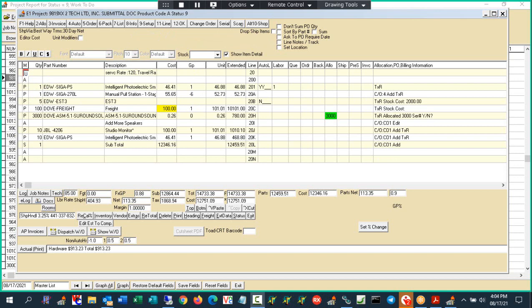Sorry. Okay. The problem is that when a job is created and a salesman comes back and they have parts they forgot to put on or parts that they want to return, they're going in and changing all of these lines. They're changing everything to make the fixed price still the same and the cost close to what it was. If they're putting negatives on these projects, it comes back when it gets billed like it's inventory. Well, most of the time that's not the truth. We're not even getting the parts back.